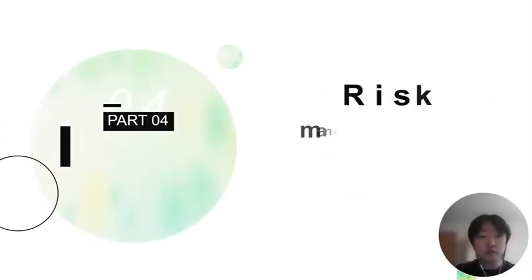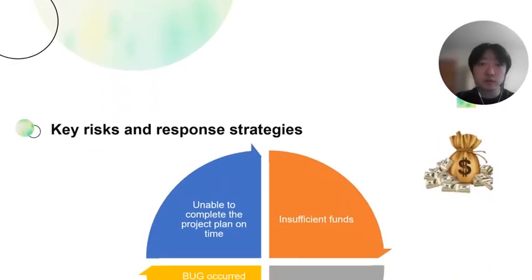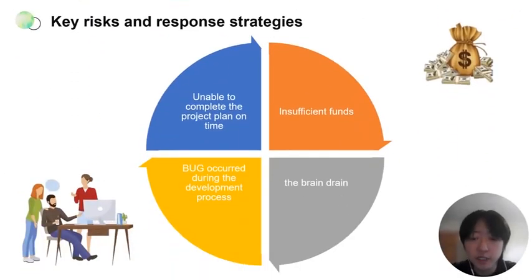In terms of risk control, we first identified 4 aspects that may cause task failure, namely money, time, personnel, and technology. In terms of money, we should avoid overspending, predict market change in the early stage, and reserve some spare funds. In terms of time, avoid failure to complete software development on time. Refine the schedule and check the work before each delivery node.